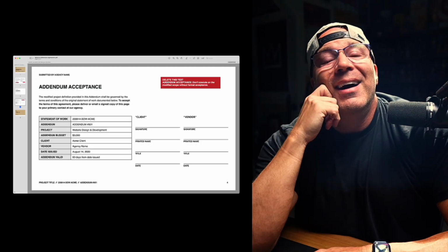Not too shabby. If you are not sending change orders to your clients, you're leaving a lot of money on the table. We tend to just absorb the extra stuff. We're like, oh, I don't want to make my client mad, so I'm not going to push back on that. I just want to keep them happy, keep them paying. But sometimes these are big changes and they cost you a lot more time and money to execute. So don't be afraid to push back and tell the client, I'm sorry, that is not included in the original scope. Here is a change order for you.